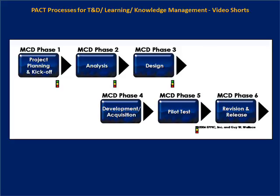What typically happens in the analysis phase, when one is looking at the ideal performance, the current state, and the gaps, is that it is sometimes discovered that developing any training will not address the gaps and their root causes. I learned a long time ago from Joe Harless that when asked to start a training and development project, not to challenge the client, but to work with the client to ensure that we did the analysis that would help them discover, along with us in the analyst role, what the root causes of the performance problems are.